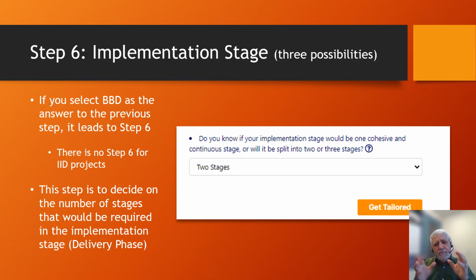They just put a project in the system, and basically we have existing forms. They fill that form and they submit it. And that project goes into what we call the parking lot. Once it is in the parking lot, it stays there until a senior manager, a sponsor, will go in and activate that project. So we have not worked on the project yet. The only thing we've done is we entered it into the system and the sponsor activated it.